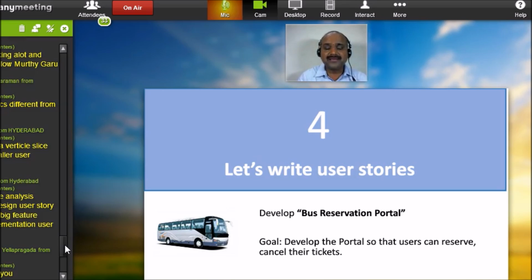For example, there's a gap in functionality, or some incident is there. You need to analyze it. Only after analyzing it, you can actually take a step of how to take it forward. So you need some time to analyze it. So there we use the word spike. When you say spike, it is a definite amount of time, say a 50 hour spike I am taking. That means 50 hours worth of time you are taking. In that particular time period, you make your hands dirty, you understand, you troubleshoot, you reproduce, whatever you think, you do analysis. That is one scenario.